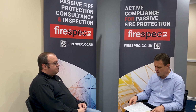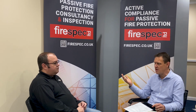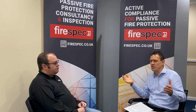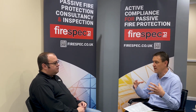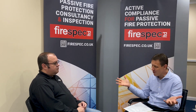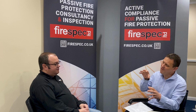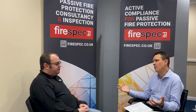There are so many other problems I could talk about, design stage, how to design. We find that a lot of the problems we've had, let's go back five or six years, where we were starting to work closely with main contractors on inspecting their live buildings. We'd get invited to come in once all the fire stopping was finished, and we'd go, no, it's all wrong. Why is it all wrong? Well, you've not allowed for your aperture edge spacing, not allowed for your service spacing, nothing supported, you've got no insulation, a plethora of problems that we would find.